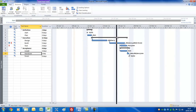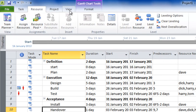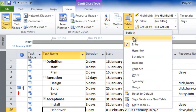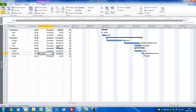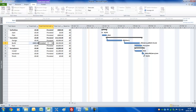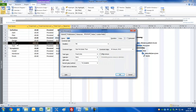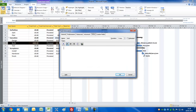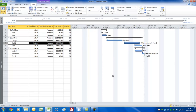This is the Entry table — let's peel this away. If we go to View and choose Tables and use the Cost table, it has a fixed cost field. For the Build task, in addition to the drum of cable, we'll need some other materials. Rather than include those in the resource sheet, we'll add it as an expense — let's have £400 as a fixed cost. Like any task, I'll double-click on it, go to Notes, and make the note that the £400 is for hotel and travel expenses, just to help remind you what that £400 was for in the plan.